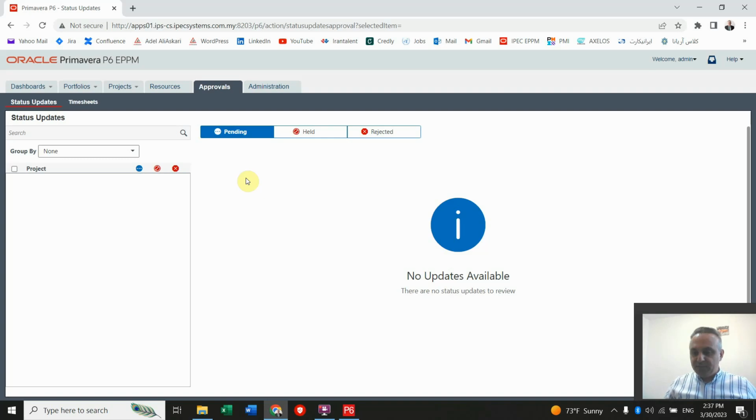All the projects that you already created in Primavera P6 are easily transferable to EPPM, but not in the XER format, the file extension that we already know from P6. You have to change your project to XML, and you can import your XML into Primavera P6 EPPM. Also, we know that XML is providable from other solutions such as Microsoft Project and also Microsoft Excel files. It means you can have communication between the plans provided in Microsoft Project or in Excel and import them here in Primavera P6 EPPM.